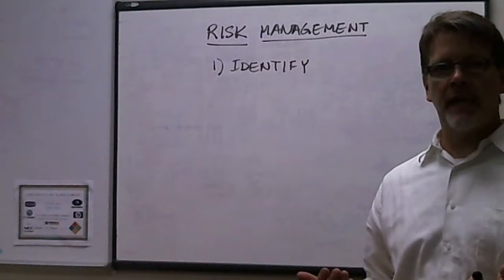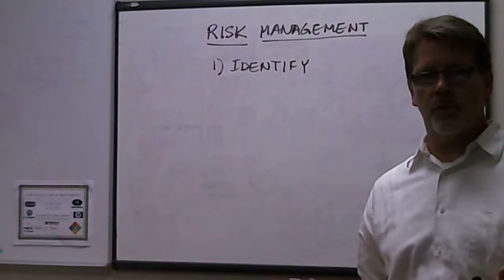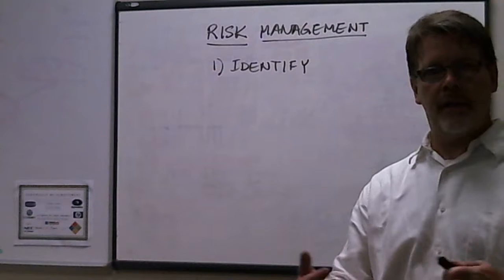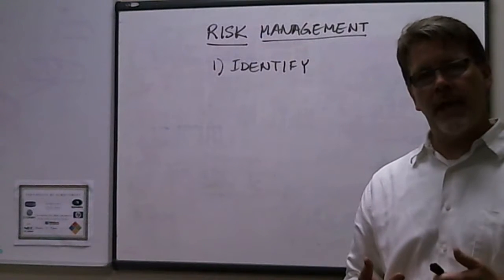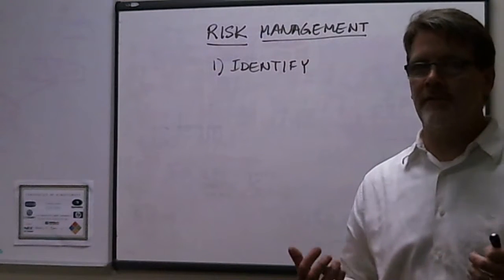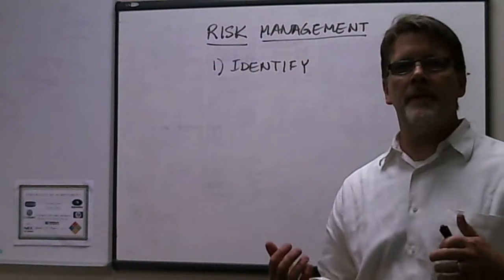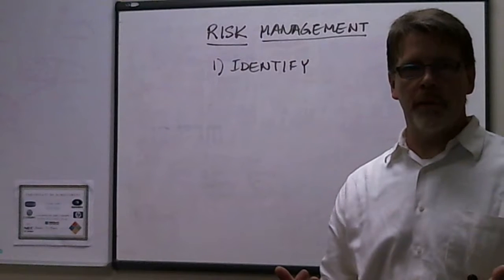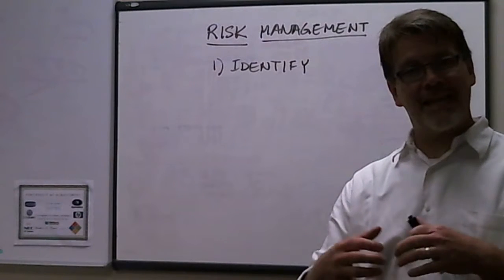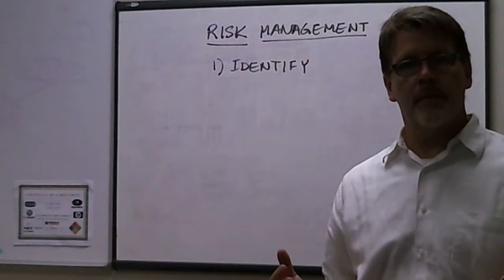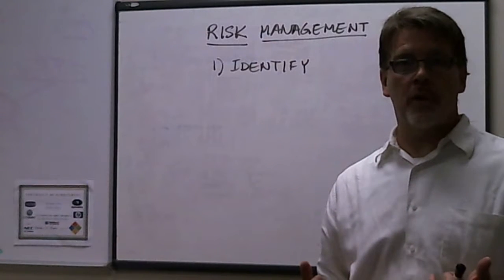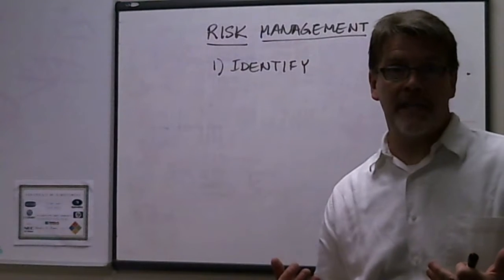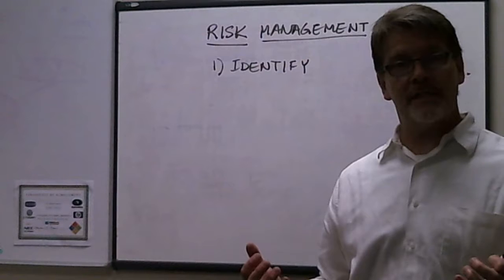Now, I know there's the challenge of the virtual need, that we don't get together physically and have a roundtable. But if you can, that's the ideal, even if it's in a virtual environment. If not, maybe we brainstorm ideas. Maybe you find someone who can be responsible to collect everyone's brainstorm of risks for the project. That person collects them, categorizes them, and then redistributes them to the rest of the team.